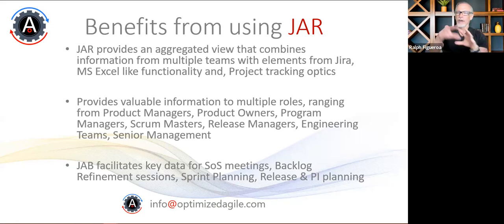And you have optics in the far right. I will showcase this on the screen when we get into the hands-on. Those project timeline optics are more like Microsoft Project, where you have Gantt chart-like views. And think of Gantt charts not in the context of, oh, we're going back to waterfall. It's more about providing optics so that people outside of the team, senior directors and VPs, can get a sense of the execution of epics or features in the context of the milestones that we're trying to hit before the release of those epics to the market, to the public.